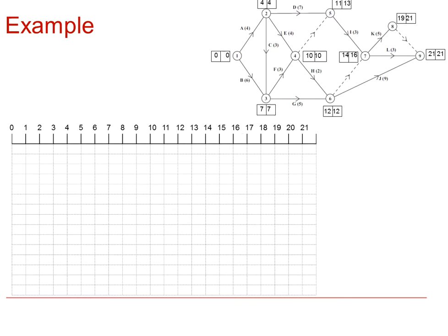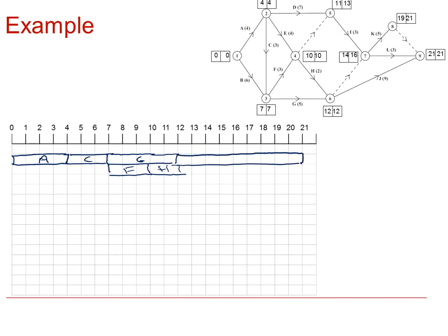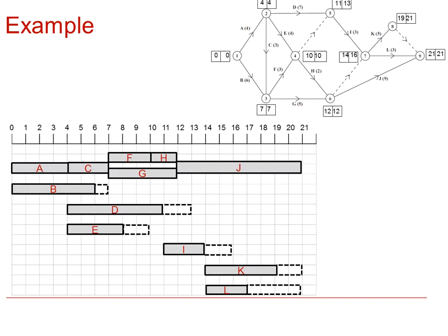We would set up our timeline placing the critical activities on the top row, where there are 2 options. We will show these in parallel. And then we will start placing the other activities below. And then working out the floats as we did before.